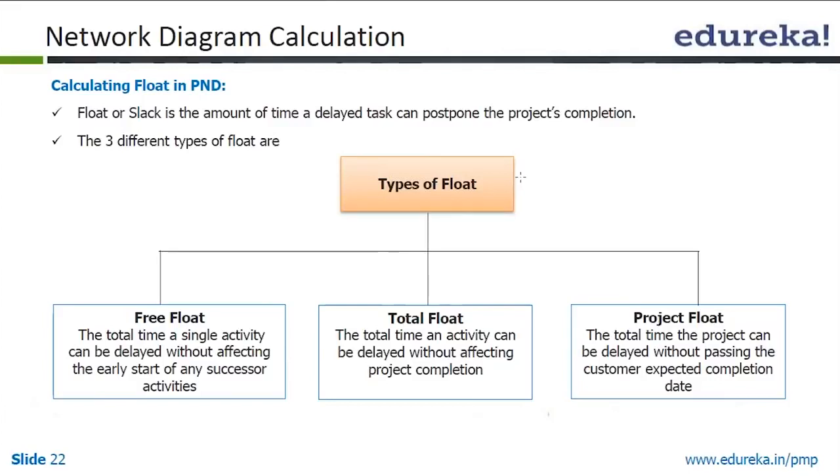So that means, as per your current requirement, let's say you have committed that you will complete a financial accounting project by 31st December 2014. Actually, internally you have decided that you will complete it on 30th November 2014. Now total float and free float are related to the 30th November 2014, so you are tracking with respect to that for all practical purposes.